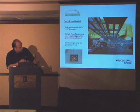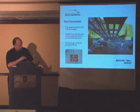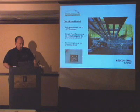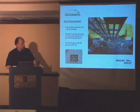This shows a typical grout pocket with the shear studs that are in there. In the case of this particular bridge, these shear studs were shot out in the field. That isn't the standard. The standard is that they would be shop fabricated and shot on the shop floor so that each of the grout pockets have their shear studs installed.